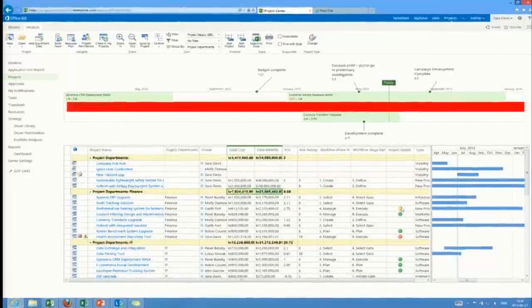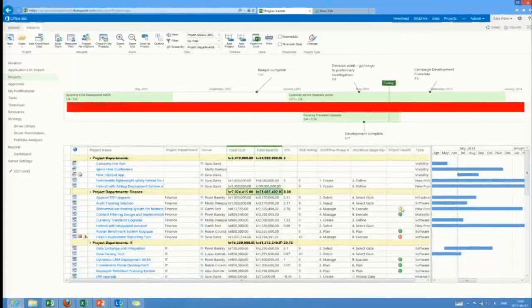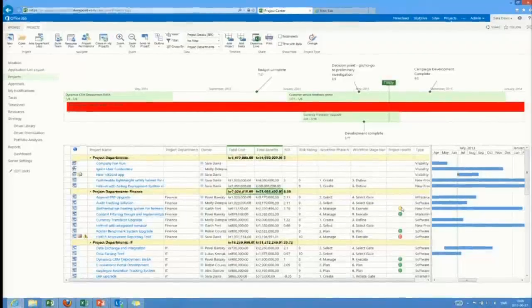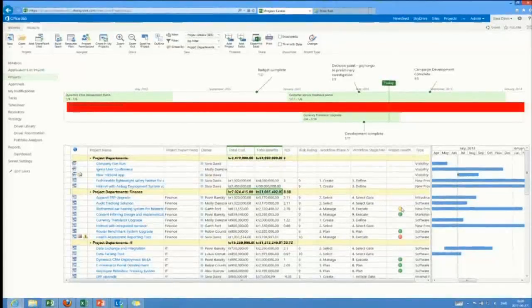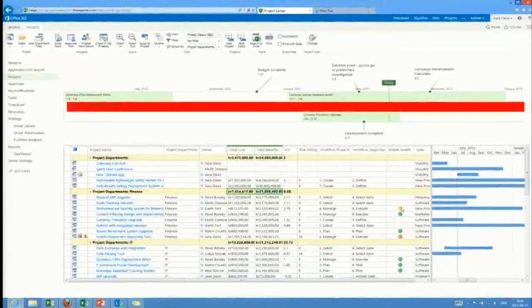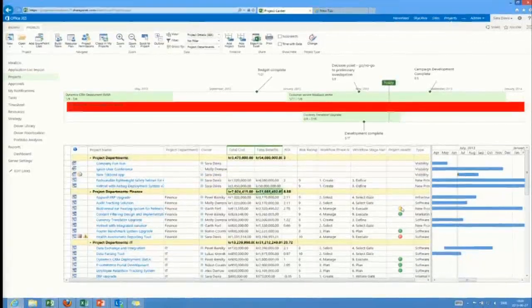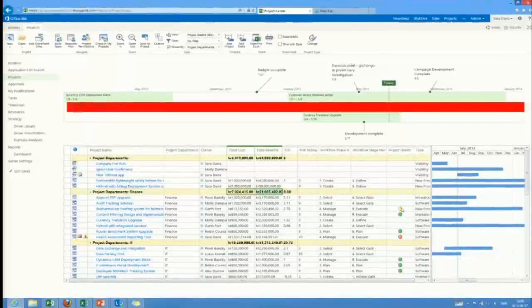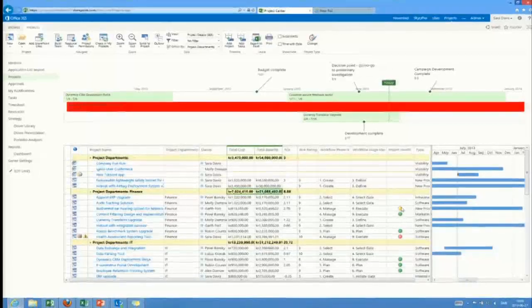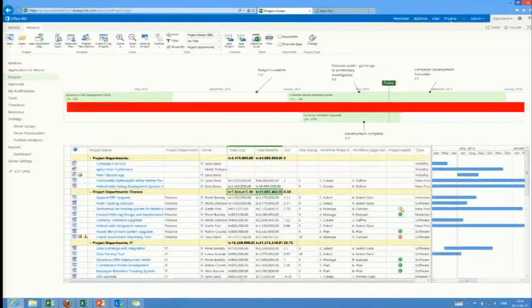The project manager thinks the health is green or amber or red, but it can also be a calculated field. So, for instance, what would make sense here is we could compare the total cost, the estimated cost of the project from the beginning, with the actual cost we have running in the plan, right? And that would bring us up with a very useful KPI for cost, essentially. You could do the same thing for scheduling, etc. Unfortunately, I don't have it in mind right here.